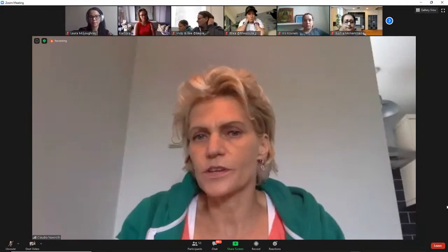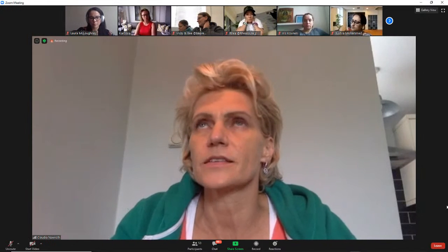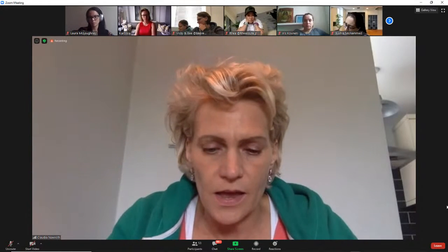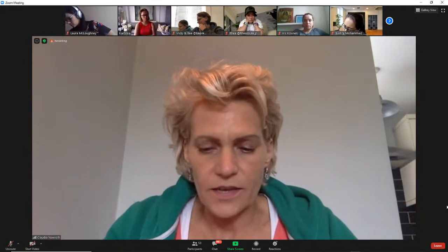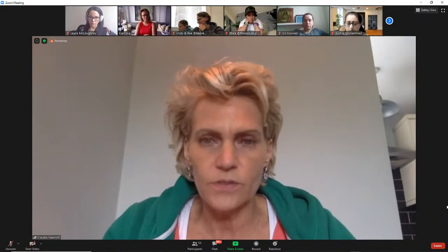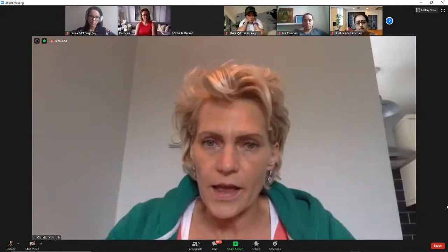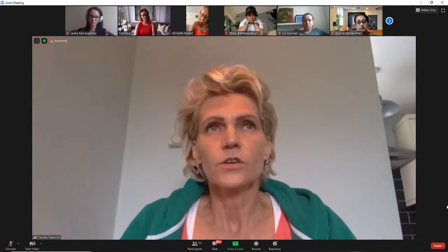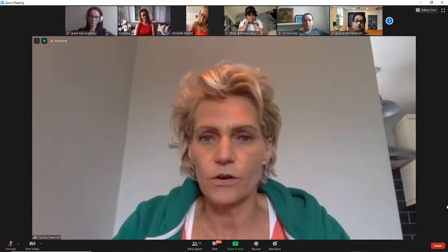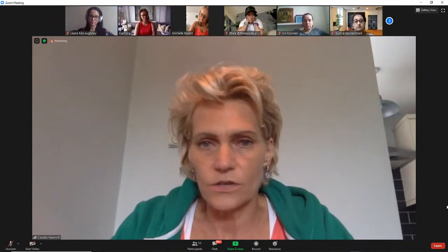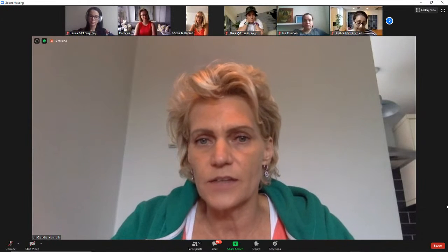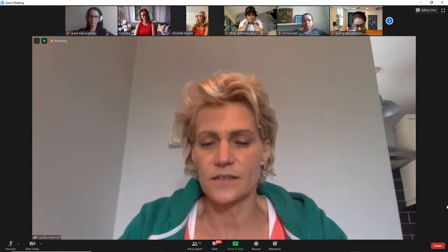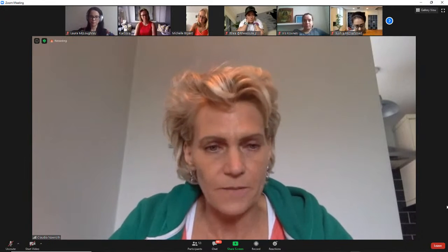Cool. Yeah, I would totally agree with you, Laura. The thing is, sometimes you can even negotiate the professional fees. I did that on a project where I asked some architects to quote and an interior designer to quote, and their quotes were just too high compared to the overall budget that the client had. And I said, well, if you come with your usual 9% on the build cost fee or whatever, the client is not going to hire you. So I really managed to negotiate that down. It all has to be in relation, it has to make sense. And yeah, it's negotiating sometimes.